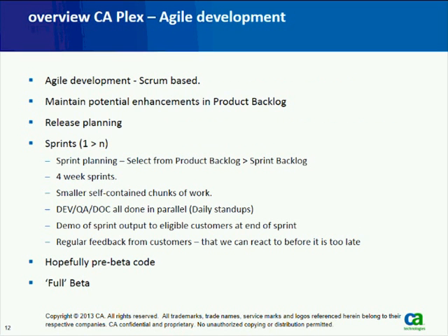So the Scrum methodology really enables us to hopefully put sprint cycles around the development of our features. All of those things that we just discussed in the previous slides, things for calendar year 2013 and 2014, we're putting into a product backlog. Then we plan our release, and we go through those backlog items and groom them. We estimate how long they're going to take, and then we plan out how we're going to deliver those through a series of sprints.